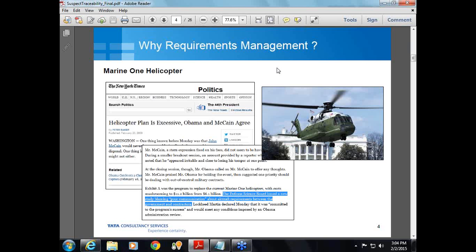So what exactly happens if the requirements are not managed effectively? Without effective requirement management, business users will not have timely access to accurate information, and this will hinder communication. It will also contribute to delays, errors, and excessive rework. To avoid this, requirements have to be managed properly. A study has estimated that being late to market by about 6 months or so will cost organizations up to 33% of the originally expected ROI.